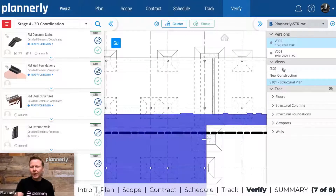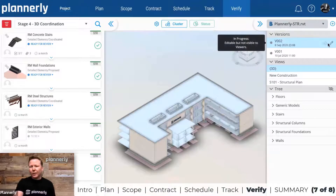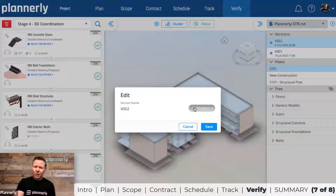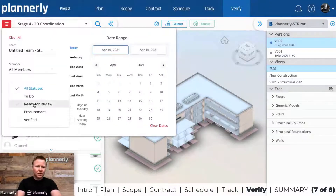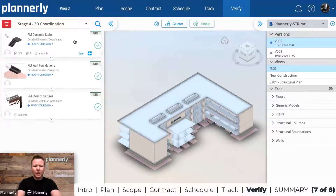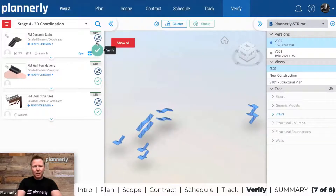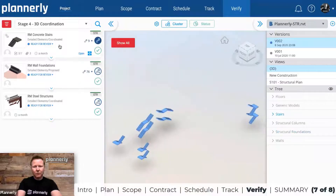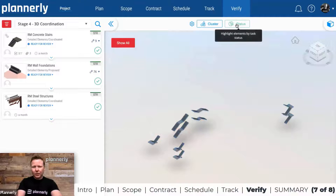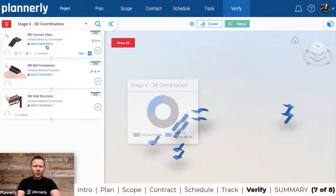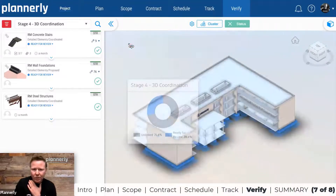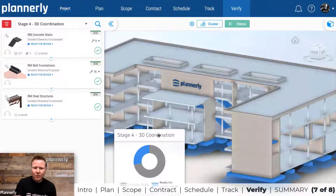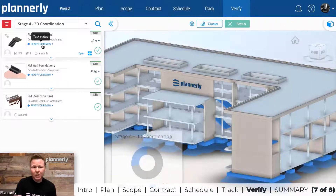Same principle applies in the 3D view. When we're ready for somebody to review this, we share the model and filter the statuses for 'ready for review.' The stairs are linked to this task, and the foundations are linked to this task — so we have two examples of tasks ready for review. The blue color represents elements that have been linked to tasks with a 'ready for review' status.